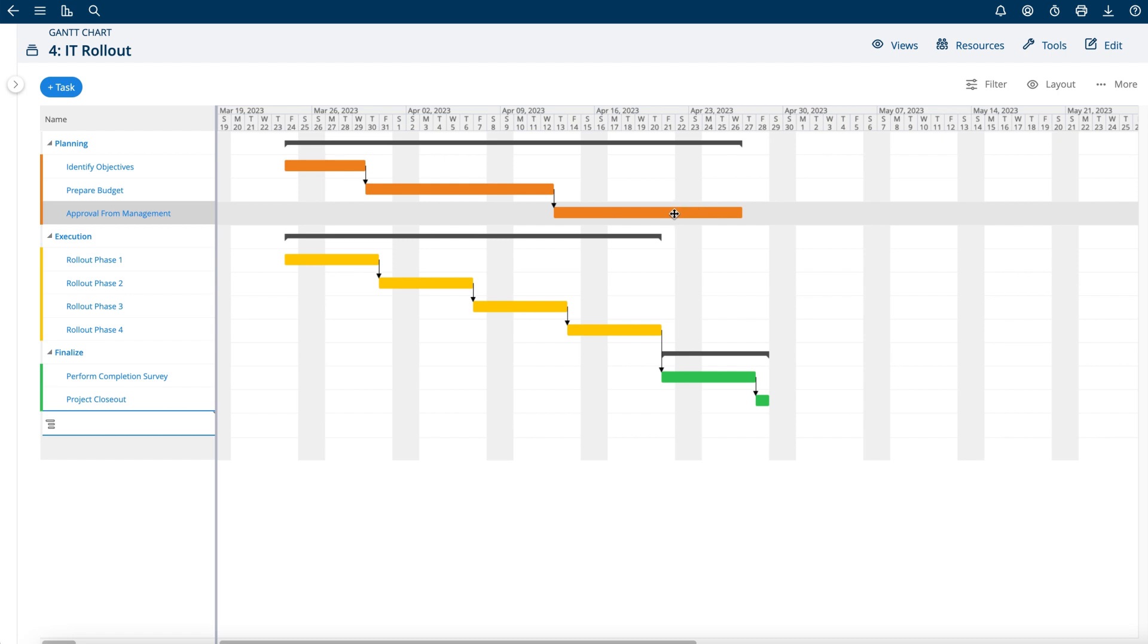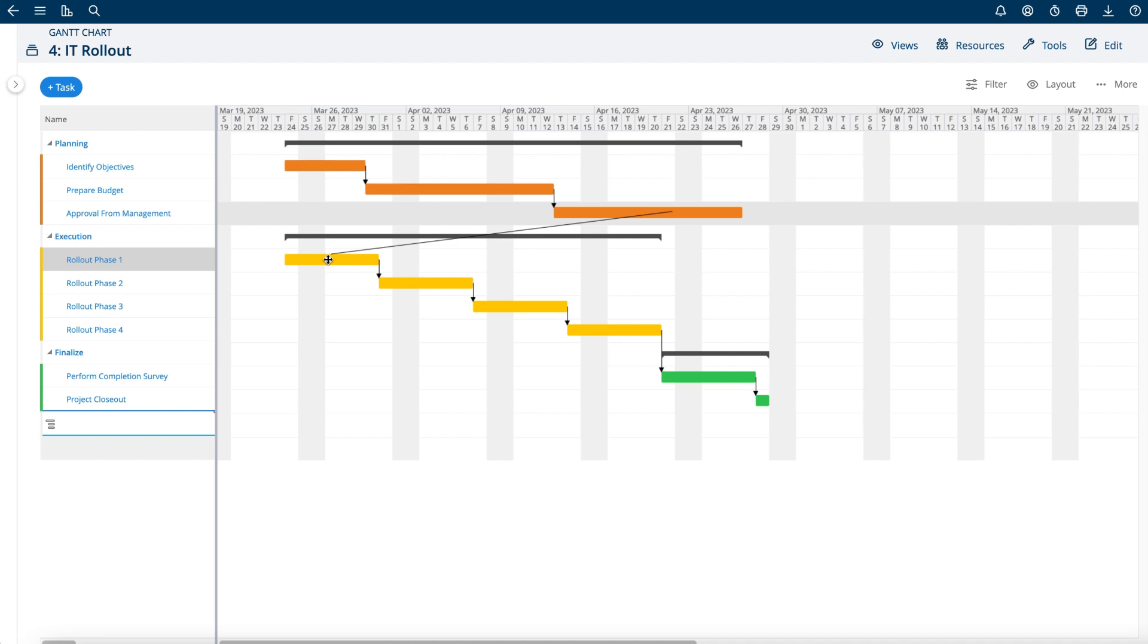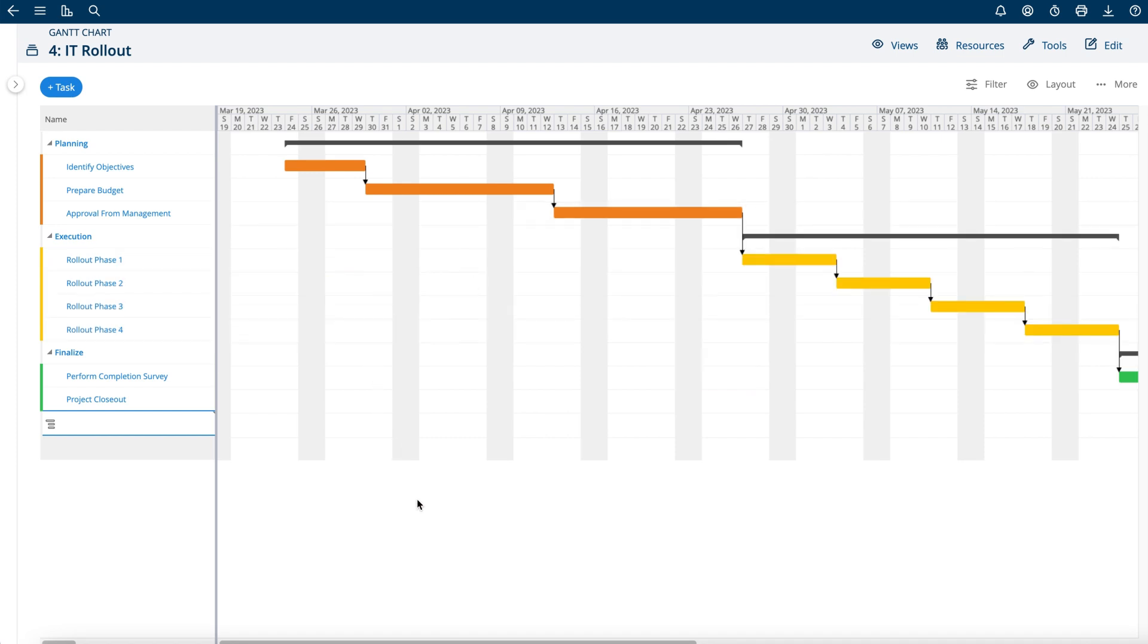You can simply drag from the task that you want to start from and drop it onto the task you need to be the successor task. Just release and now those tasks are linked up.